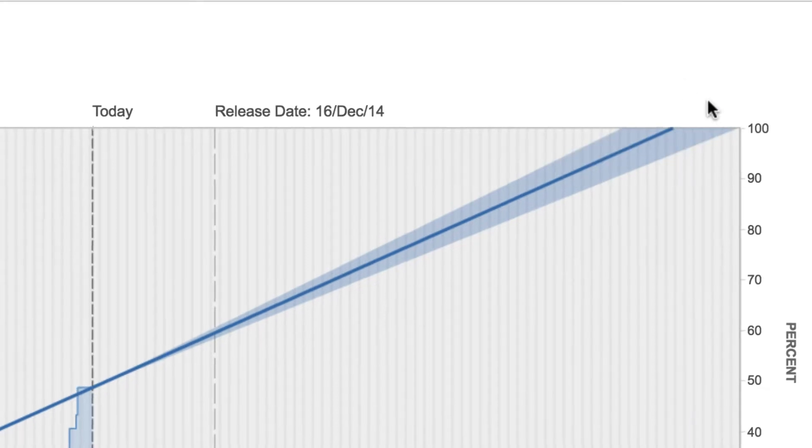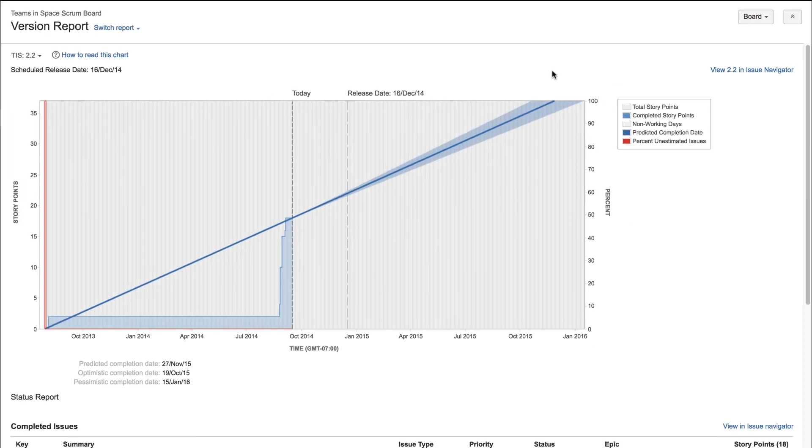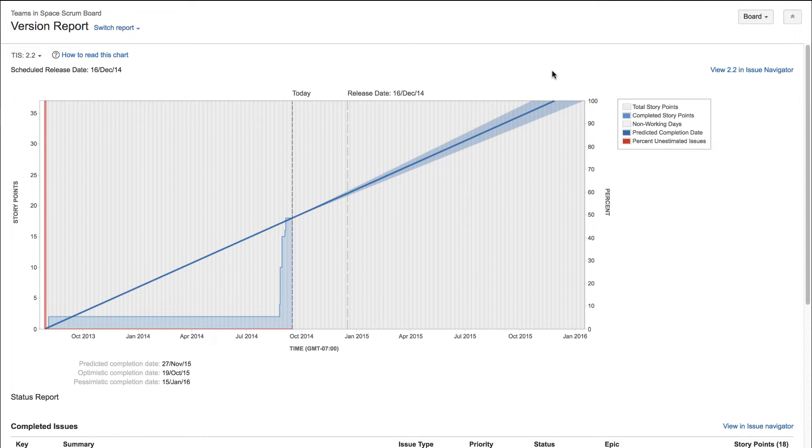The optimistic and pessimistic release predictions are calculated by adding or subtracting 10 percent respectively to and from the average daily velocity.